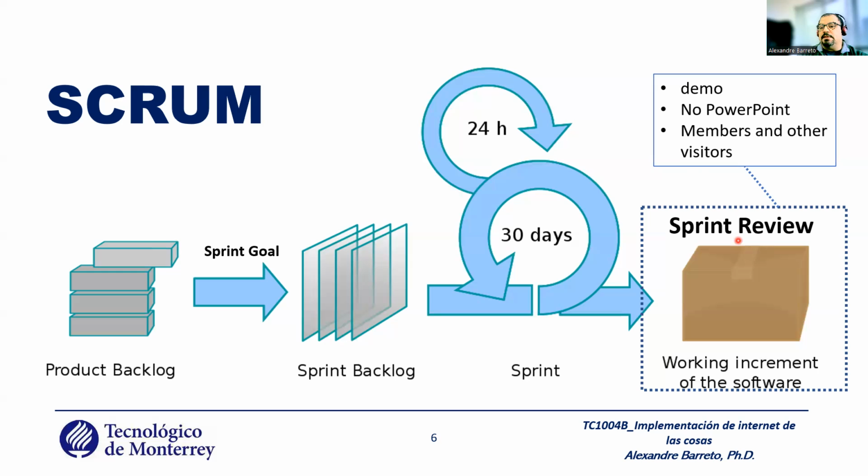And it's the time that the PO, maybe support for the clients or for the audience, say, okay, the sprint, the product is approved or not approved, and why it's not approved, or it's approved but you need to fix it. Okay, it's the time. This meeting can have, for example, 30 to 40 minutes, no more than 1 hour, but it's a demo. You demonstrate the feature that you created. It's a very important meeting.